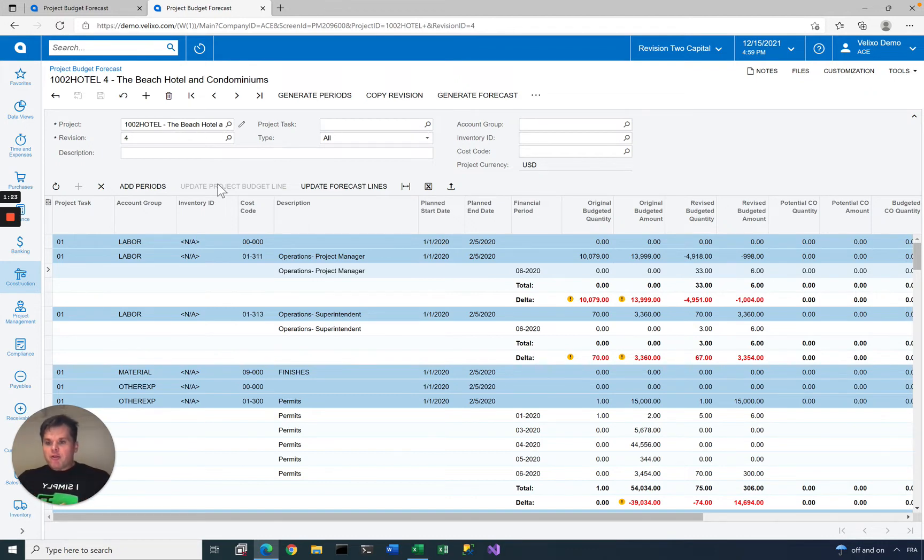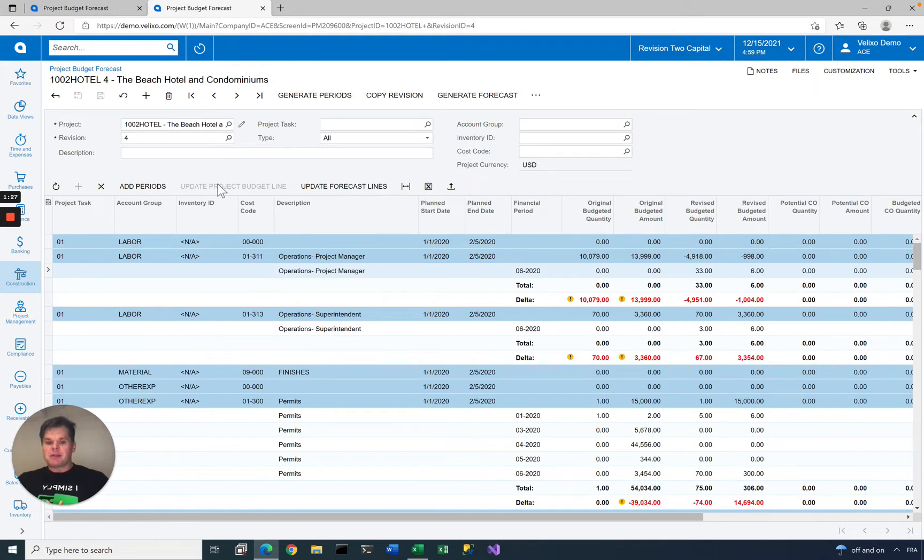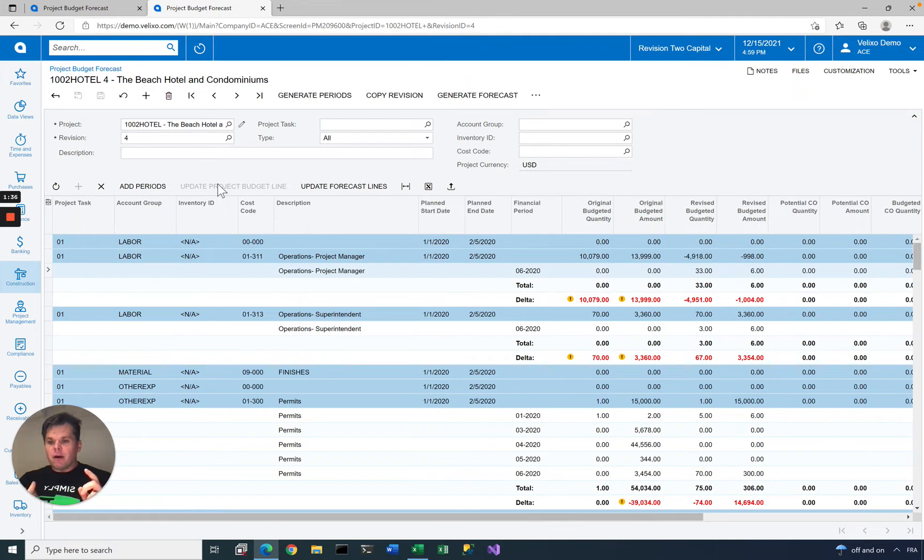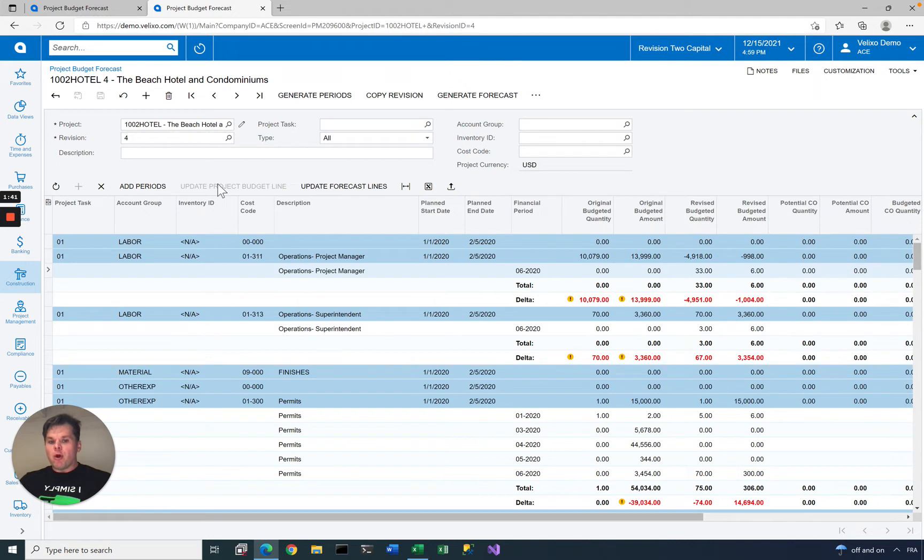The project budget forecast screen in Acumatica has some shortcomings. The main one is that it's very difficult or actually very time-consuming to add data if you have a large number of account groups, tasks, or if you need to forecast for a large number of financial periods. We have a client, for example, that needs to forecast five years out.